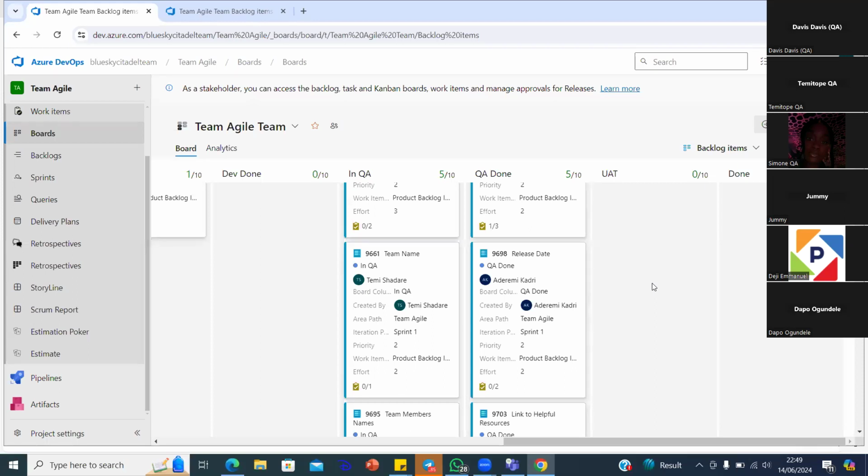By putting it in committed, you are kind of becoming a dictator, saying you have to work on this. John, I've already put it in your tray. But if you put it in committed, when John is ready, he will pick it from the waiting tray and put it in his own tray.